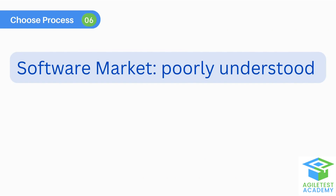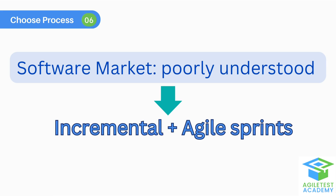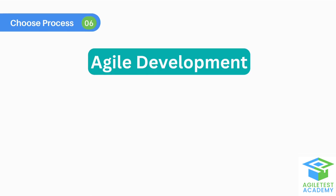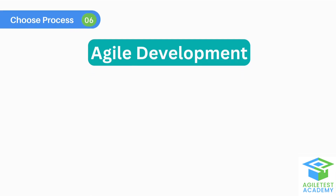If the market for the software is poorly understood, use incremental and agile sprints to get operational software in front of the customer as soon as possible. Going through all these software development processes, we see that each process has its pros and cons, and it is up to the users and your team members to decide which one to use. But we choose the agile approach because it adapts quickly to changing requirements and customer needs.